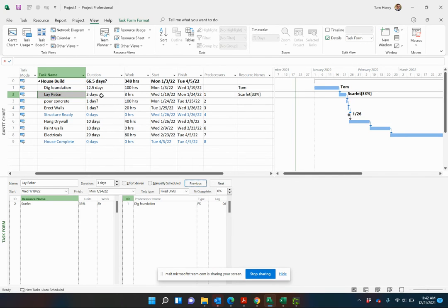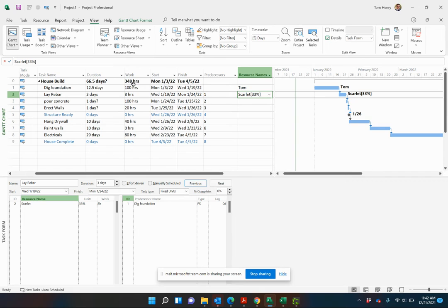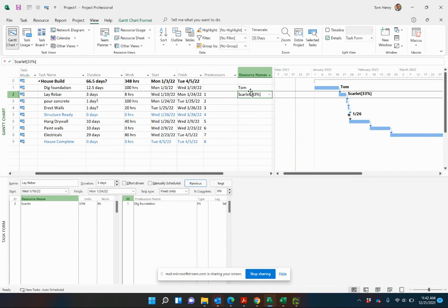Now, because it's a three day task, only eight hours of work though, she is now working 33%. Essentially she's working part time at 33% of a typical working day. As you come in and estimate the work and the duration or the duration and the work in addition to that, you can get more granular.